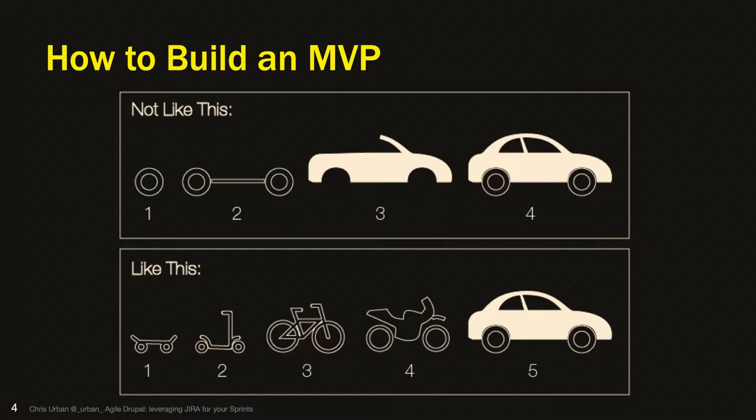And this is your typical, at least in my view, typical process for building a Drupal application or a Drupal site, something that you're doing over the course of several sprints. You want to get the basic core up and running, probably add some basic content types, taxonomy. Now you're getting into theming and views, et cetera, and refining until you get to that final product that your customer wants. So all of the things that we're going to be talking about today are really organized or oriented more towards this Scrum-based style of development.